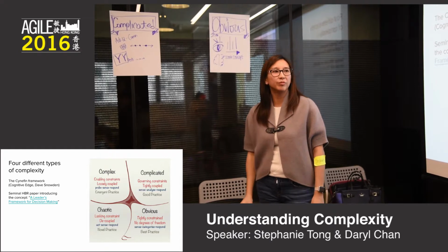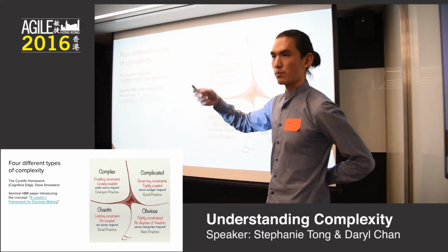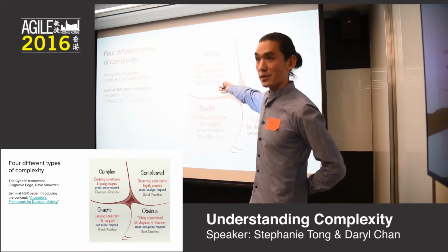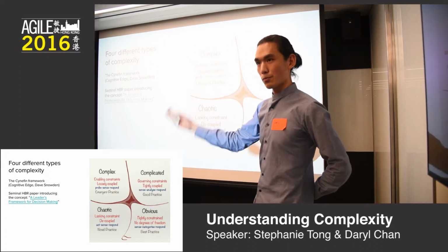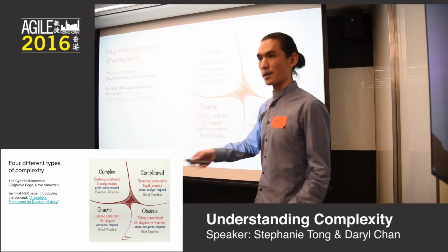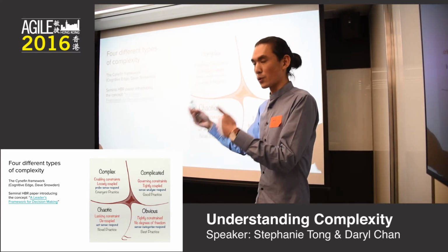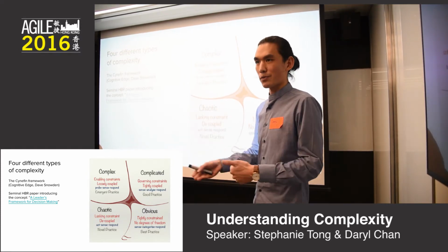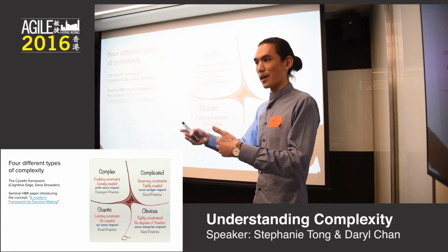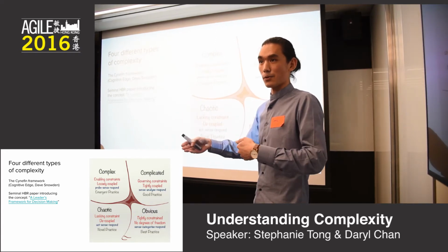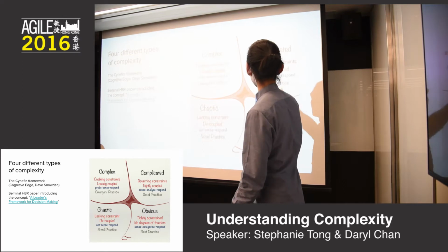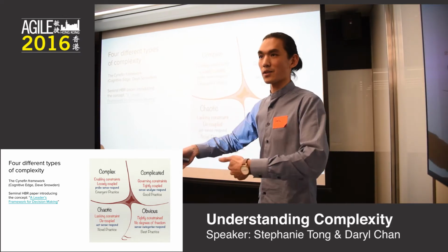Don't forget Scrum. A lot of people use Scrum in the complex domain, and after you have a few iterations, some things become easy, and the more you experiment, you realize, oh, this is the way to solve this problem. We've done it 2 or 3 or 4 times now, 5 sprints, and actually, okay, maybe now we can standardize this process, right? And move towards a complicated domain, rather than trying to standardize a process up front.